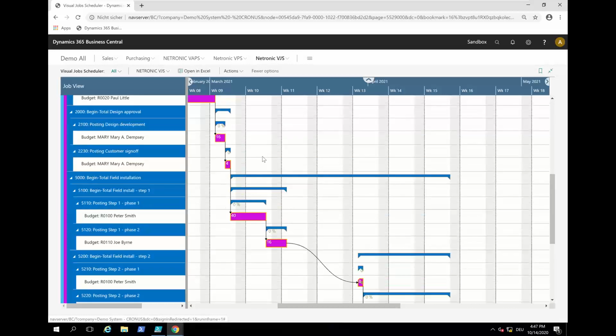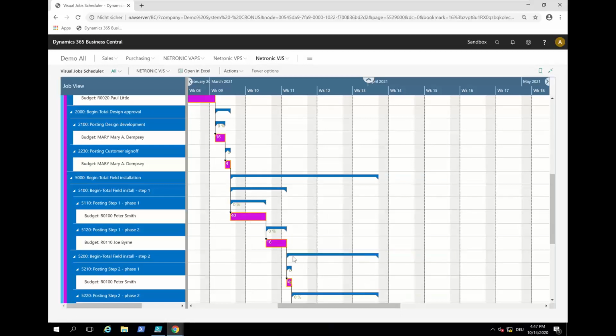First, or three. First, these links never have a duration. So when this ends, then this can start. So if I say scheduled successor, this is brought forward so that there is no time gap between those. So currently, we cannot say that there should be a time gap of, whatever, 3 days between the end of this and the start of this.